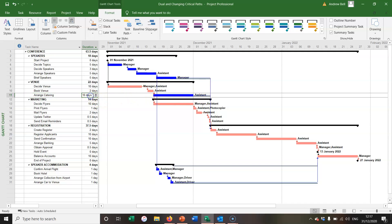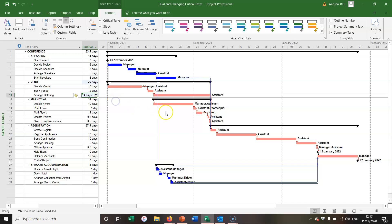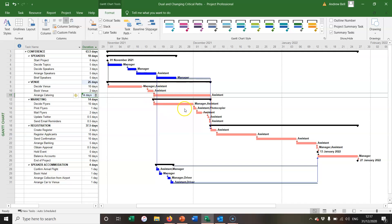However, if I increase the duration of this task to 14 days, then both of these tasks have become critical. So this is an example of dual critical paths for this period of the project—both of these tasks are critical and they happen at the same time.